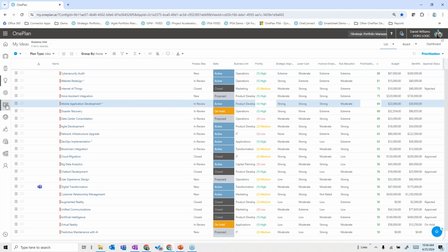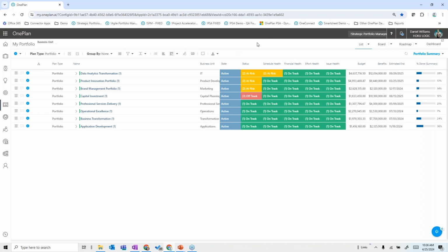As I look at the project portfolio, we can structure this portfolio flexibly any way we want. In this particular case, I've got a primary hierarchy portfolio, so we've got multiple portfolios in this view for different parts of the organization. We have programs within portfolios, and then we have projects and epics within those programs. And then should it be a more agile or product effort, perhaps we go down to a feature level that we want to track, as well as the things that we want to prioritize at this portfolio level.